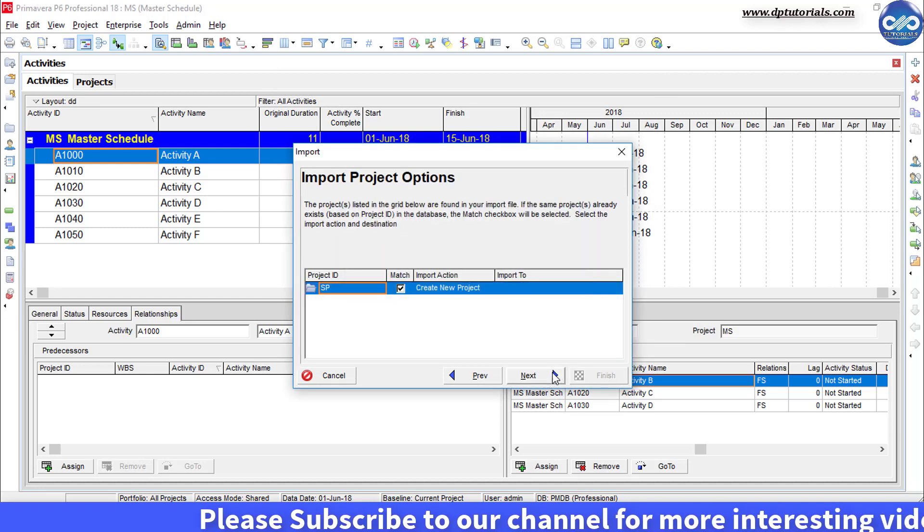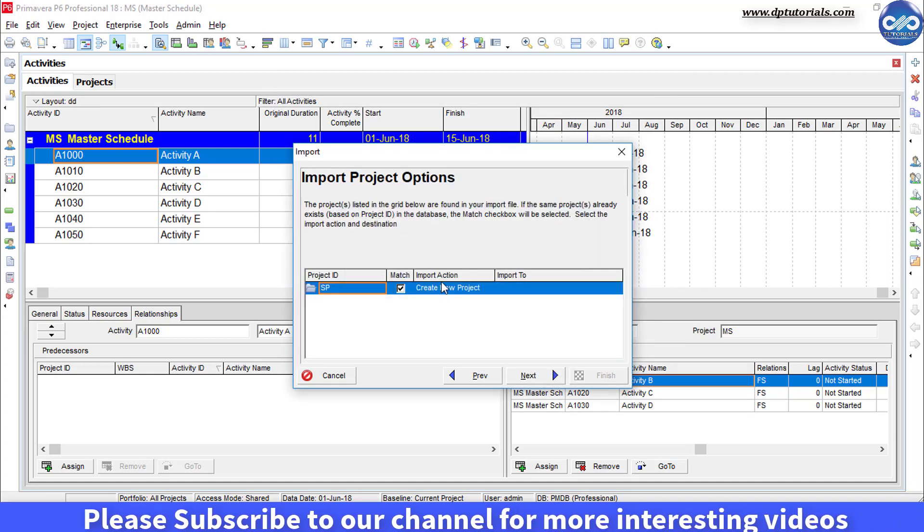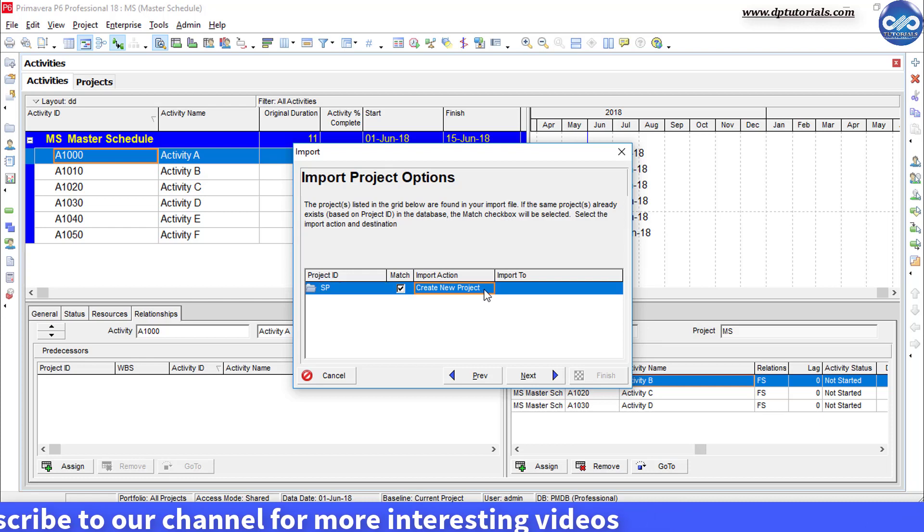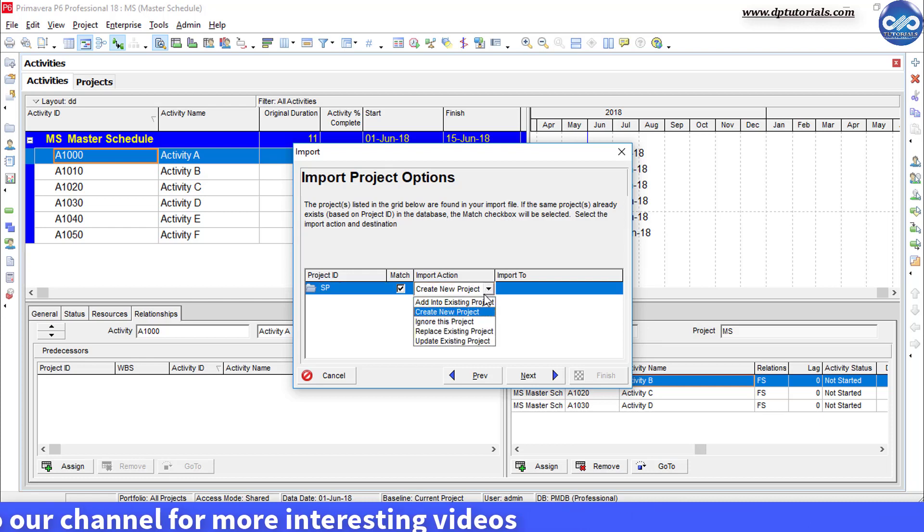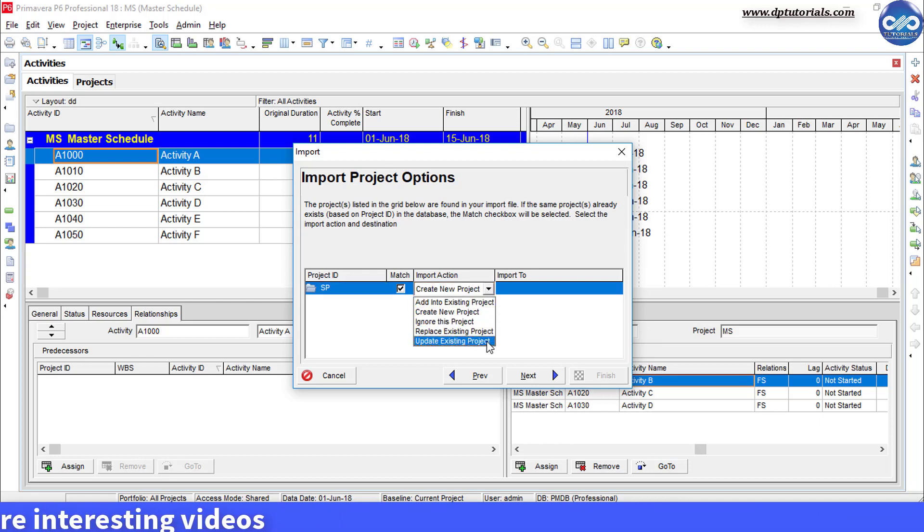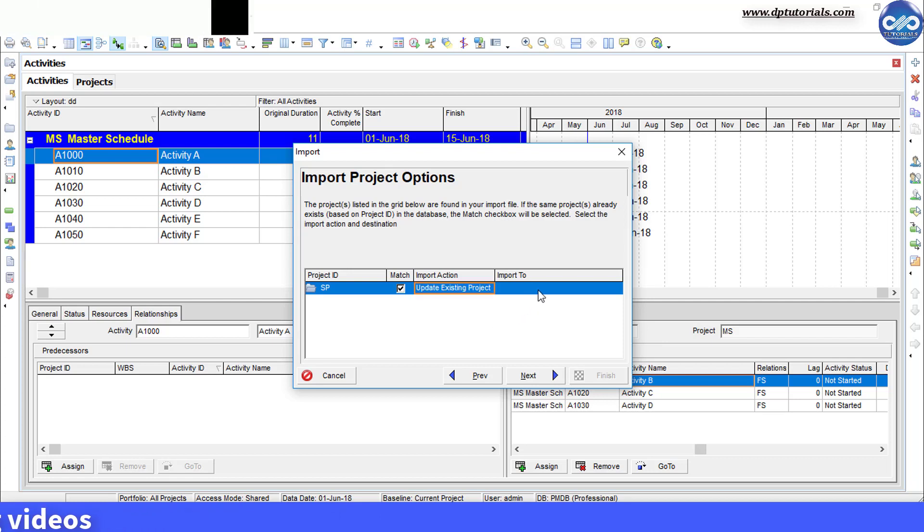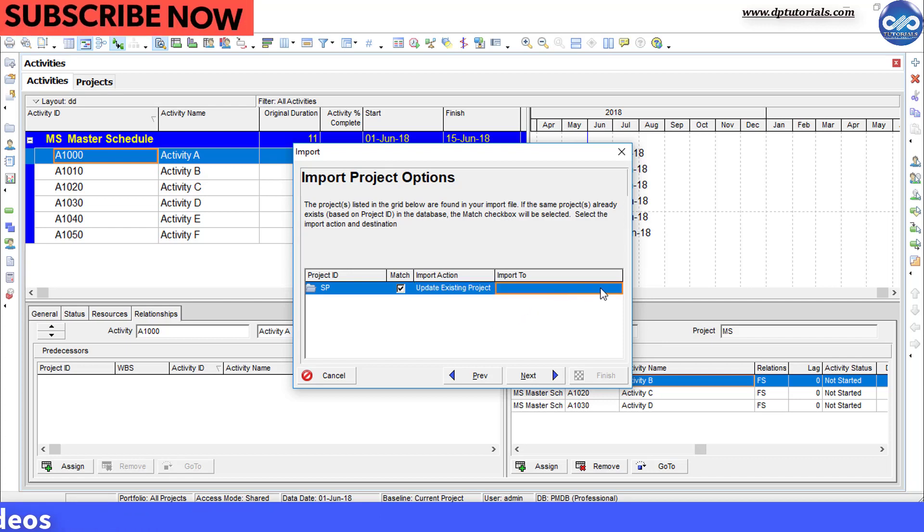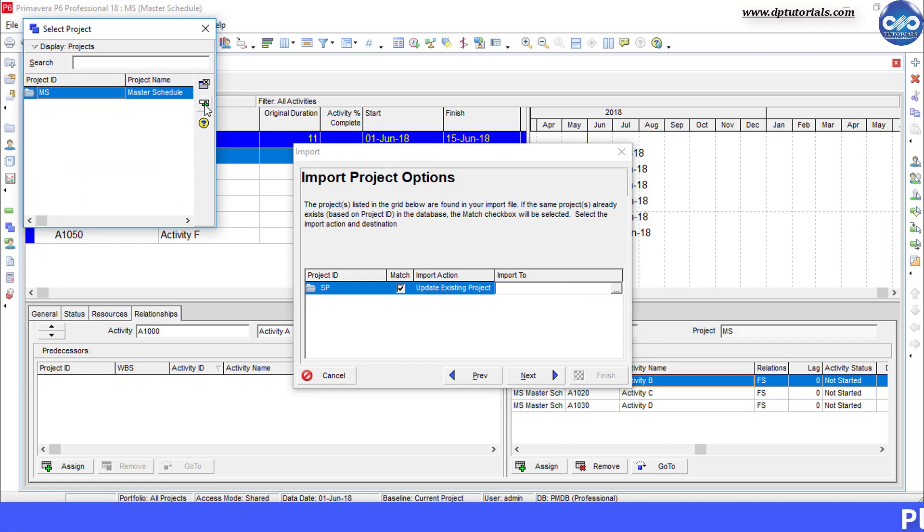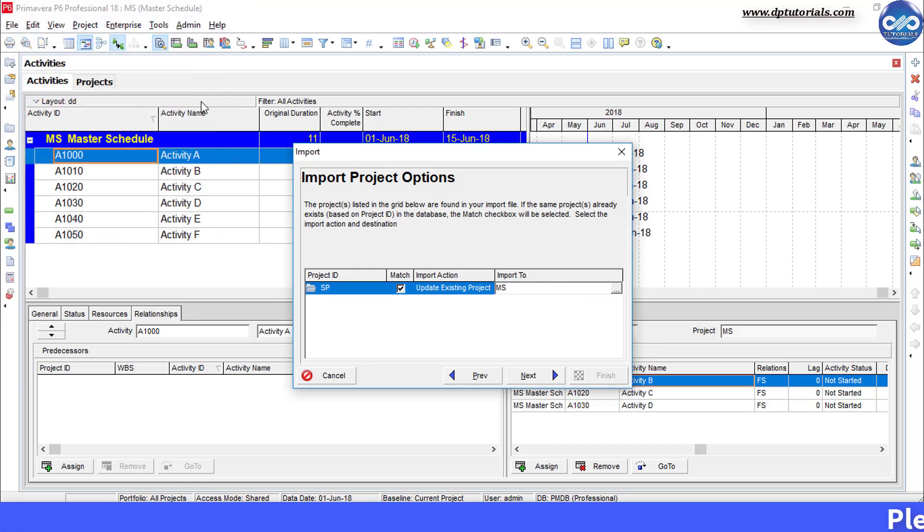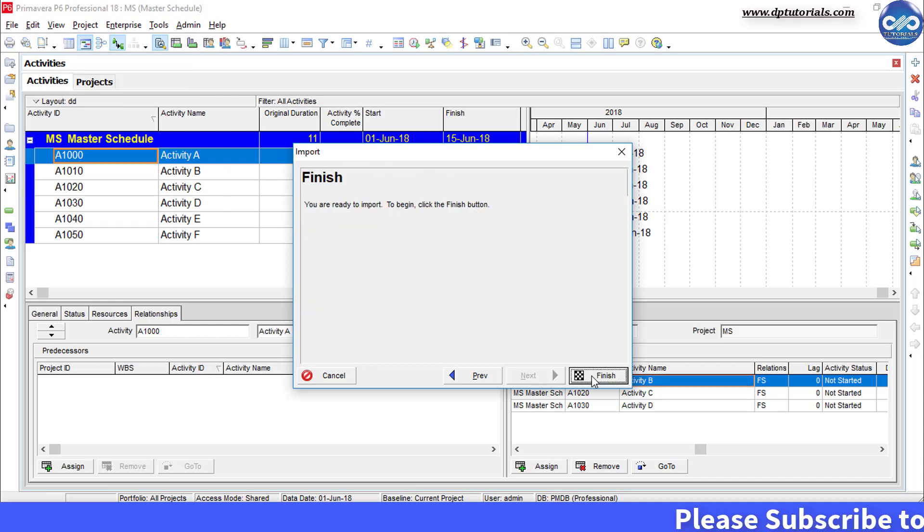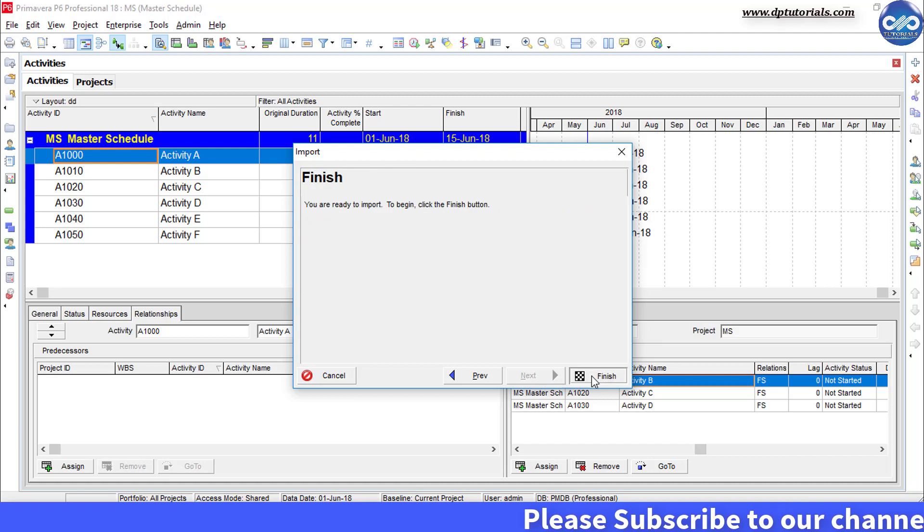Under import action, select the option as update existing project which is the last option and under import to section, select the master schedule which is already open. Now click next and finally click on finish.